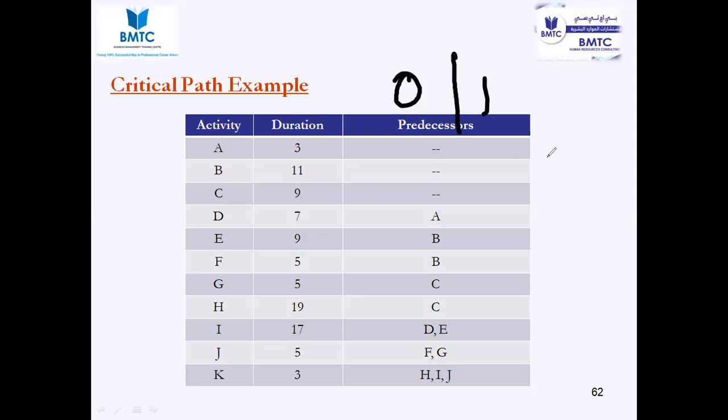Both are good, but what happens here, once you select 0, in your calculation, you don't require to calculate with +1, -1 and all. We take this one very valuable information. If you start with day 1 in your calendar, you need to make sure that your calculation should include +1 and -1. I'll just show how you're going to include that +1 and -1. If you're going to start with 0, you don't try to include +1 and -1 in your calculation. If you want to start with day 1, you need to include +1 and -1 in your calculation.